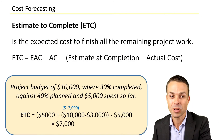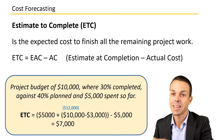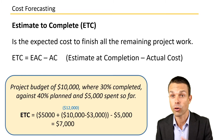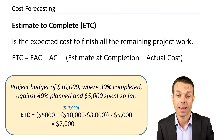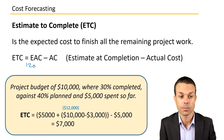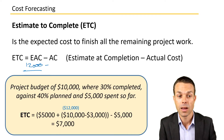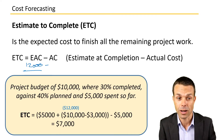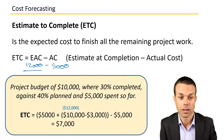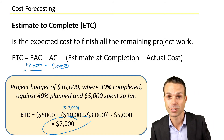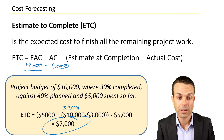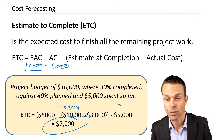Now we're up to the Estimate to Complete. This is the expected cost to finish all the remaining project work, and it equals our Estimate at Completion — which we said is twelve thousand — minus our Actual Cost so far, which is five thousand. So this one is nice and easy: twelve thousand minus five thousand equals seven thousand dollars.